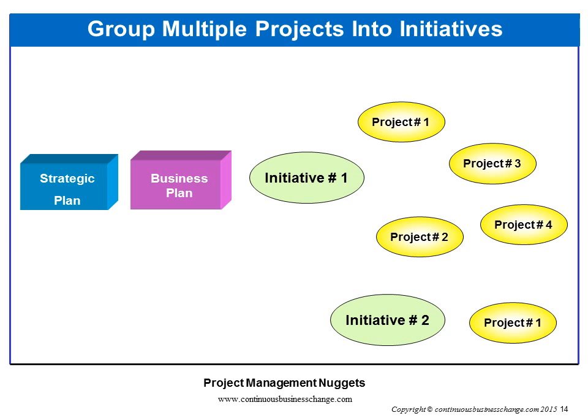If this top-down flow isn't the case in your company, if it feels like you have more projects than you can possibly complete, or if you're not sure who's doing what and how all the projects fit together, then start with the projects and work it backwards. Create a list of all projects, department as well as cross-functional.